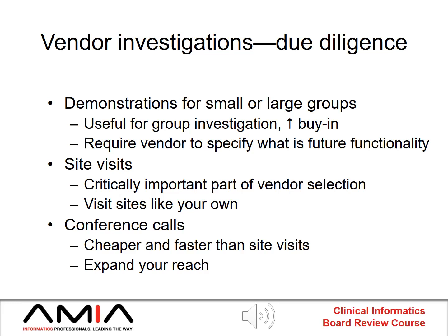In fact, my general rule is that you want to go to a place using it, ask the people who are tired at the end of the day, maybe about ready to leave, and get their candid opinion about how this system works, rather than concentrate on the PowerPoint presentation by the executives in the conference room. Conference calls are less expensive and they extend your reach, so they can supplement or maybe be the only way that you investigate the vendor, depending on your needs and the system you're investigating.